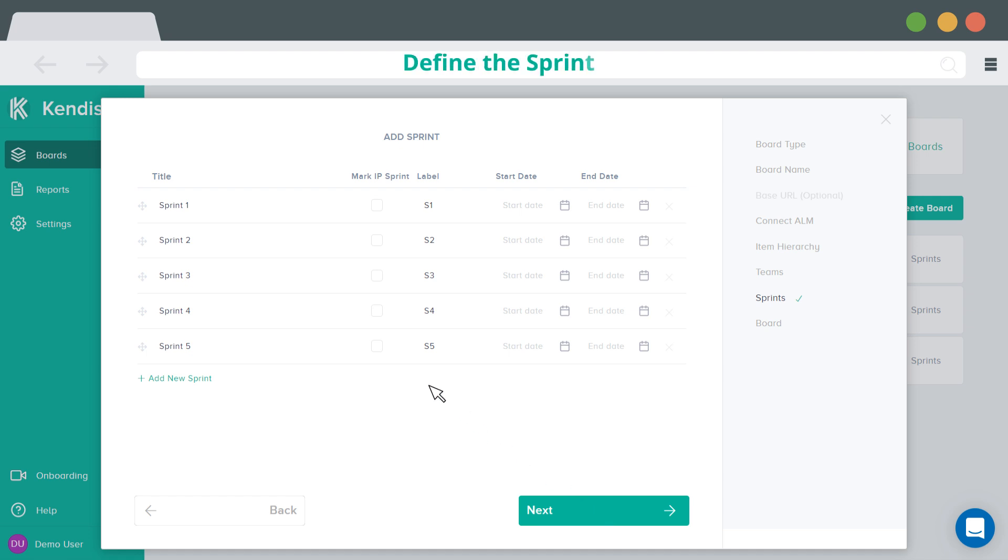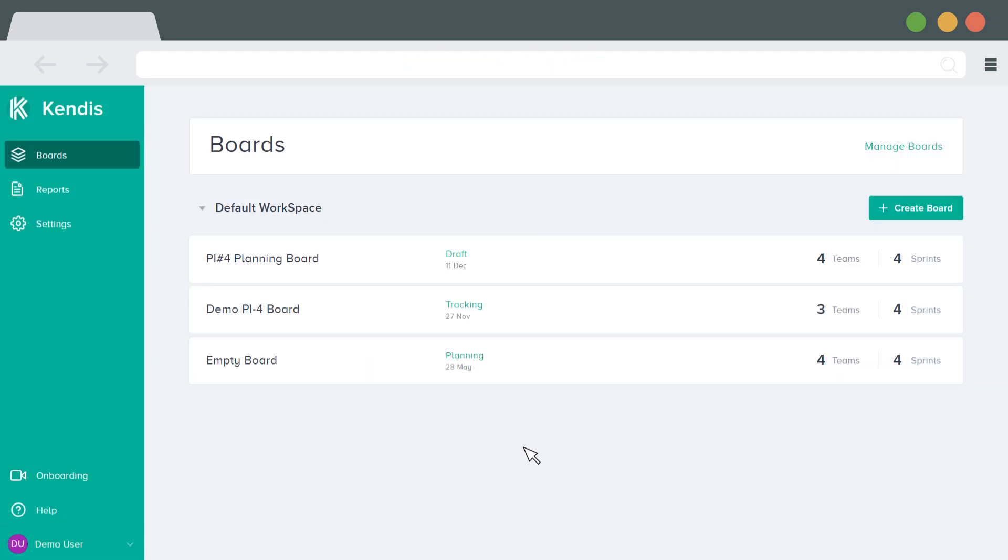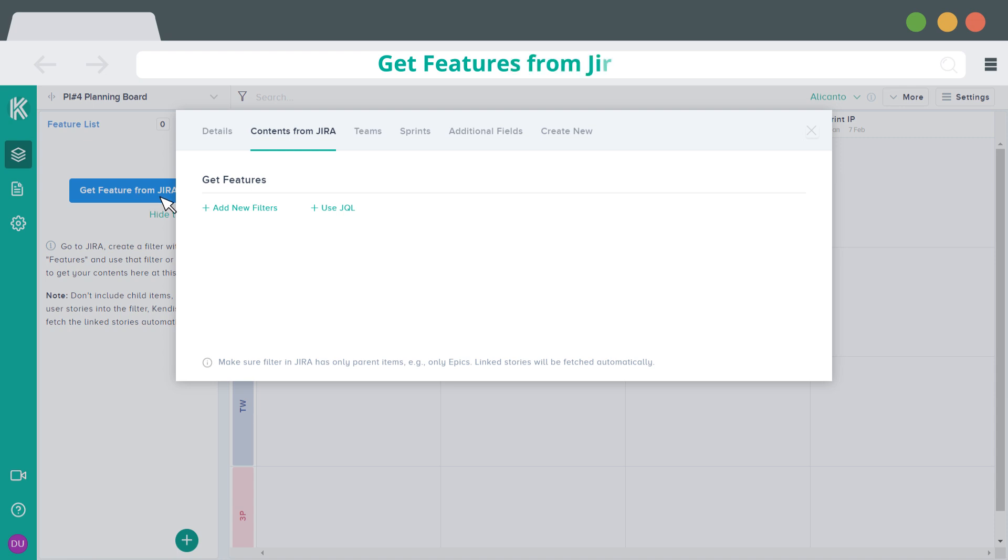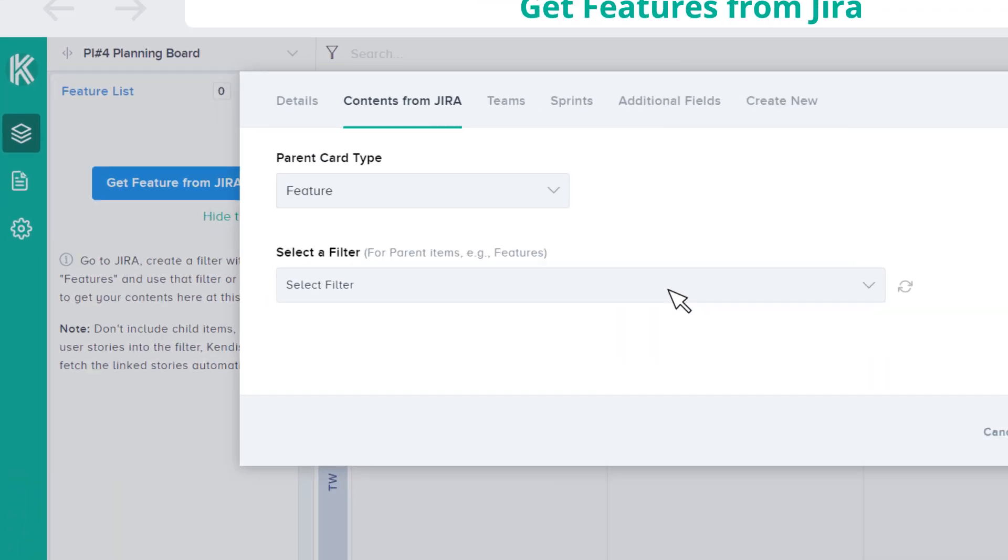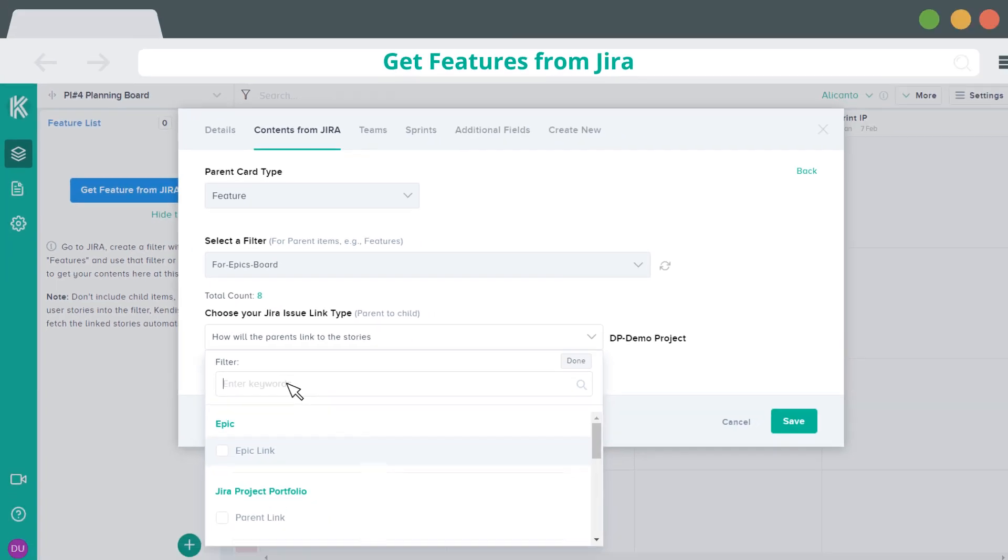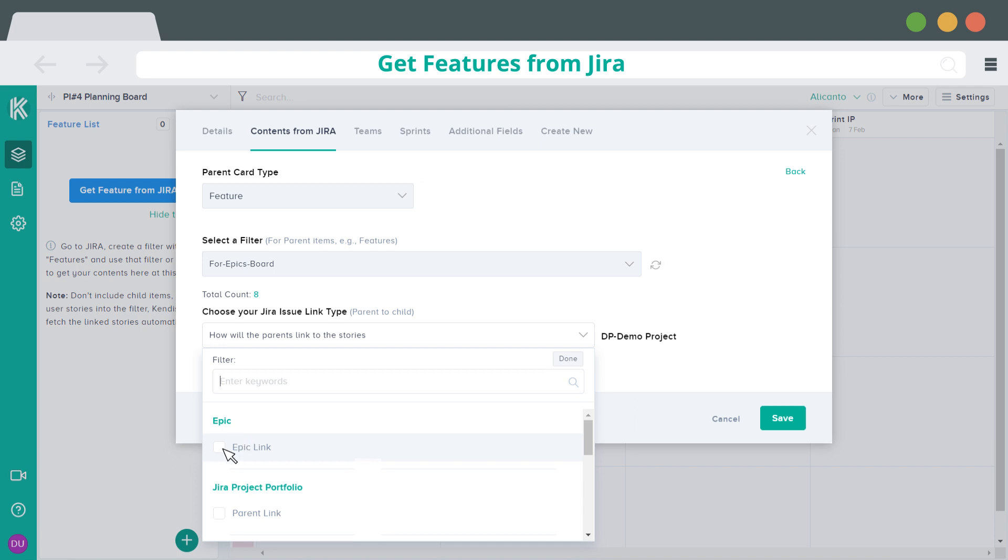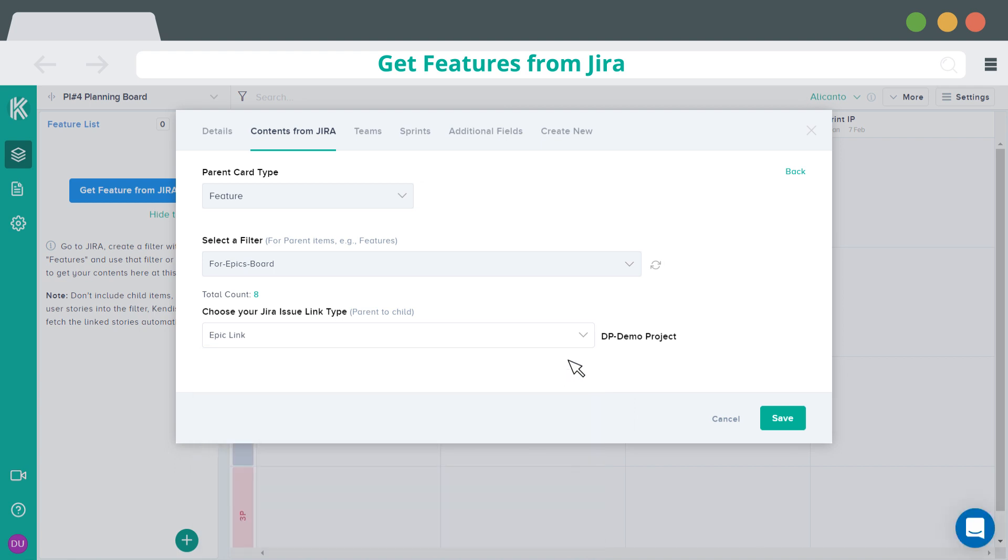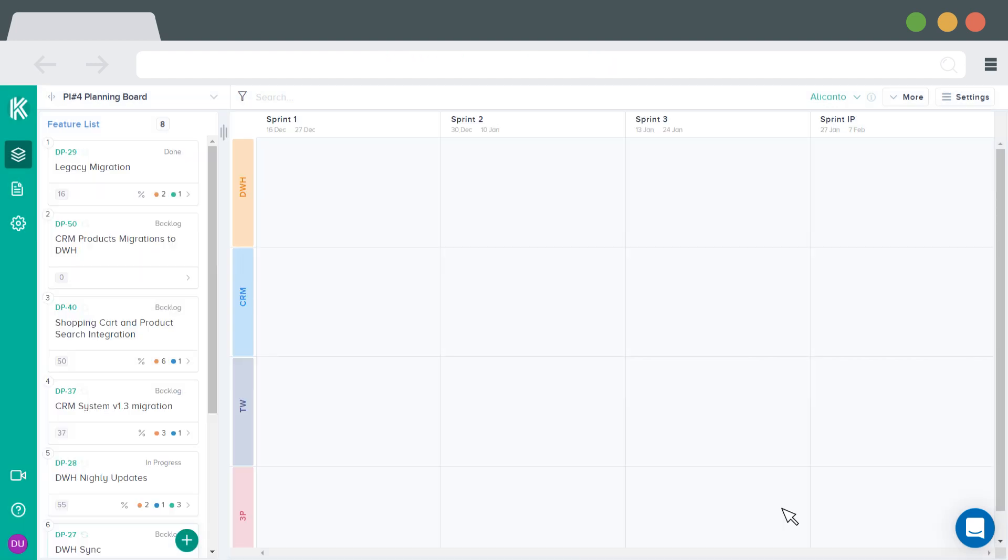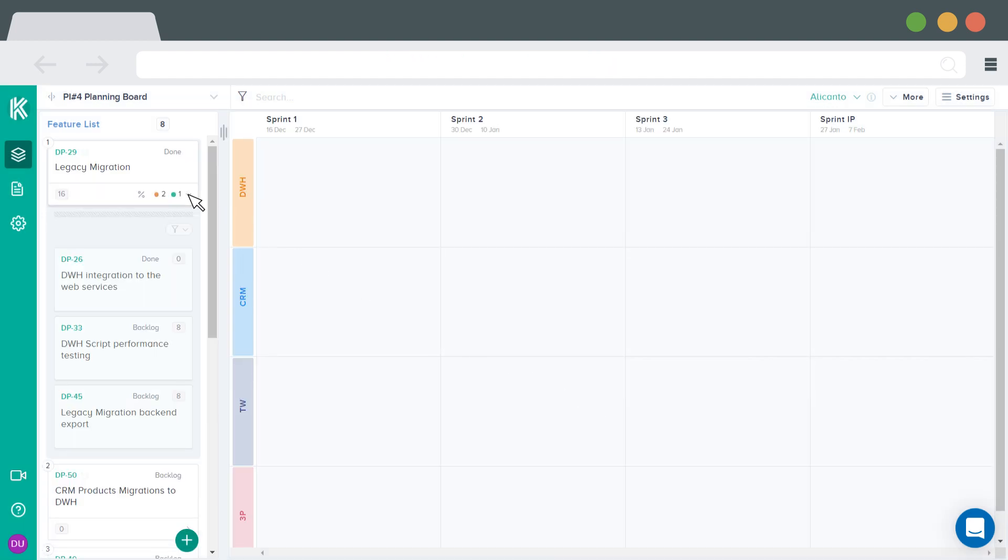Define the sprints for the program increment. The next step is get features from Jira. Kendis is flexible and supports your Jira setup. Use Jira Filters or JQL to get your features from Jira into Kendis. If team stories are already created and linked to the features, it will be fetched automatically.